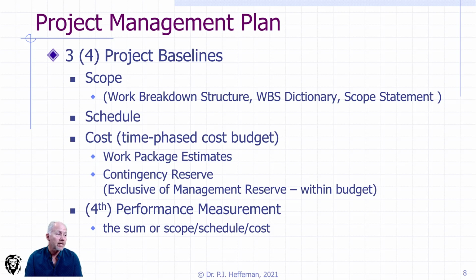And speaking of risks, your contingency reserve is the reserve that you need to cost to manage the risks identified for the project. And we'll deal with how we get to that more when we're looking at risk management. But that cost is part of the cost baseline, is the cost necessary to manage the identified risks associated with the project.